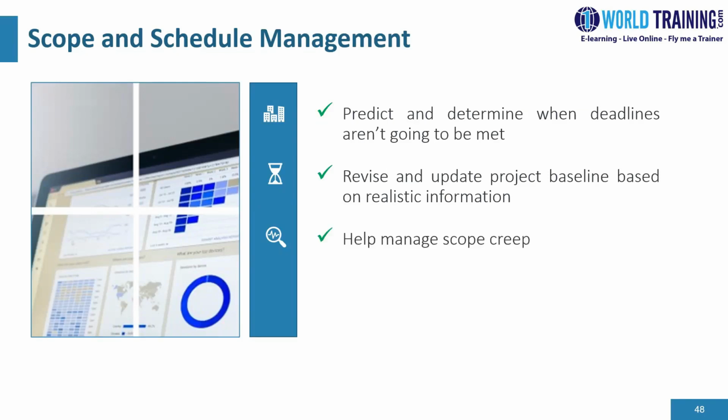Further, AI will look into the project documentation to validate project scope and manage scope creep. So what happens when we have a scope creep is when we go out of the project boundaries. So an AI system can look into your project charter, for example, or project initiation document, and based on that, it will confirm whether a new requirement is in scope or out of scope, so that as a project manager, you can manage the project scope and avoid scope creep.